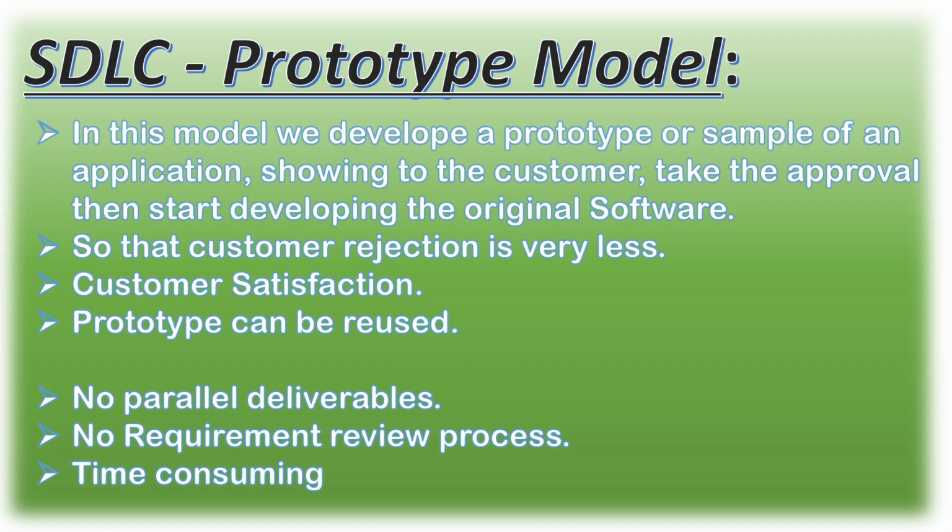But still we have some drawbacks in the prototype model. Those are no parallel deliverables, no requirement review process, and also it is time consuming, since the customer may keep on changing the prototype. So one important question is when or where the prototype model is used. We'll go for this model whenever the customer is not clear about the requirements or the customer is new to the software industry.